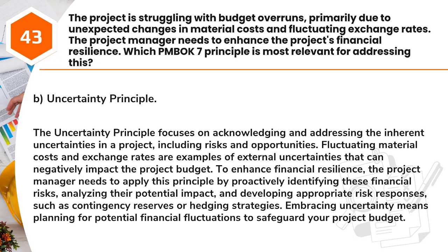Answer: B. Uncertainty principle. The uncertainty principle focuses on acknowledging and addressing the inherent uncertainties in a project, including risks and opportunities. Fluctuating material costs and exchange rates are examples of external uncertainties that can negatively impact the project budget. To enhance financial resilience, the project manager needs to apply this principle by proactively identifying these financial risks, analyzing their potential impact, and developing appropriate risk responses, such as contingency reserves or hedging strategies. Embracing uncertainty means planning for potential financial fluctuations to safeguard your project budget.